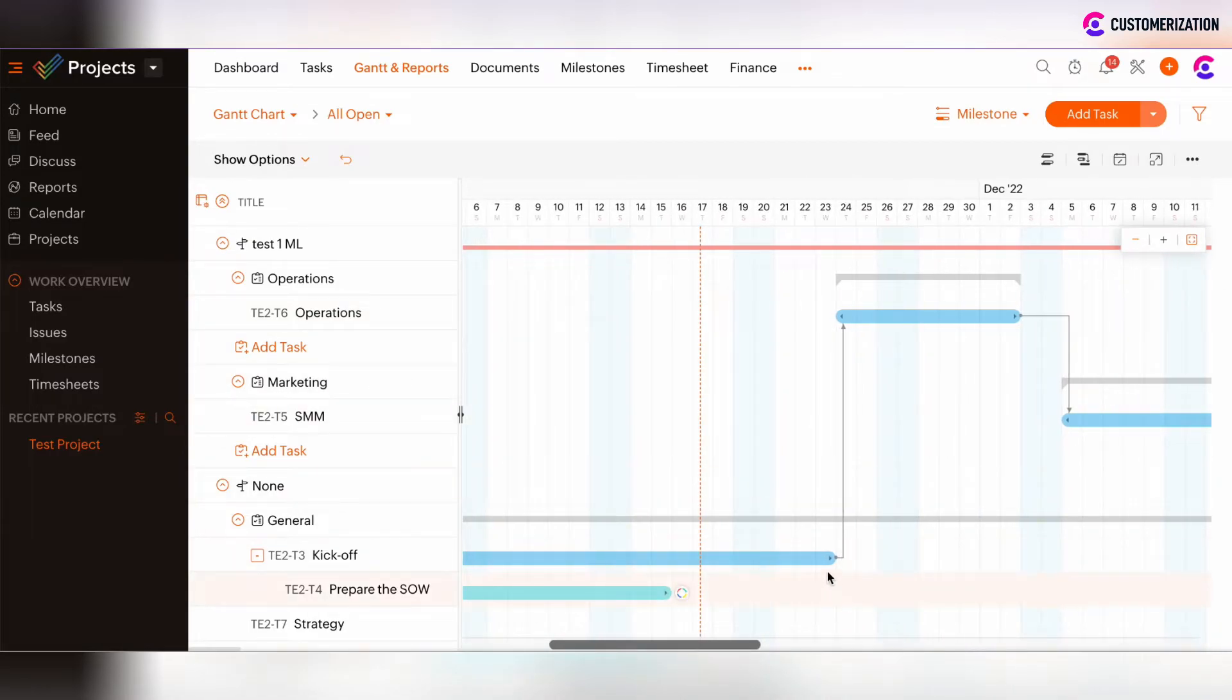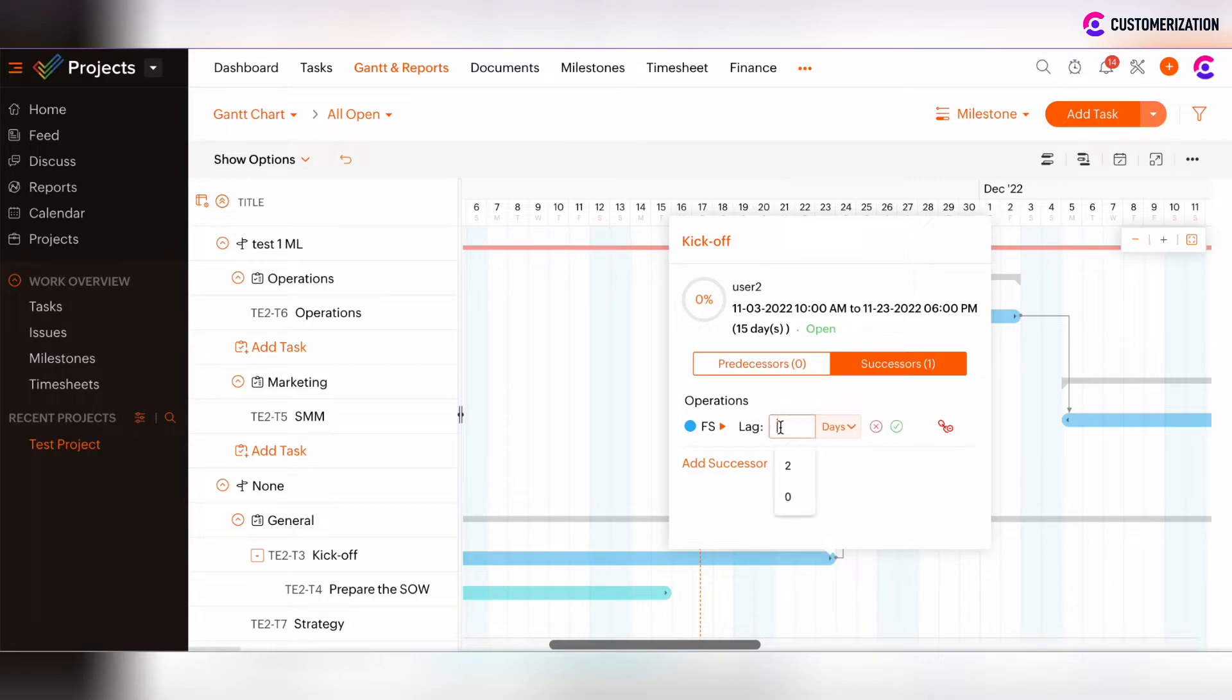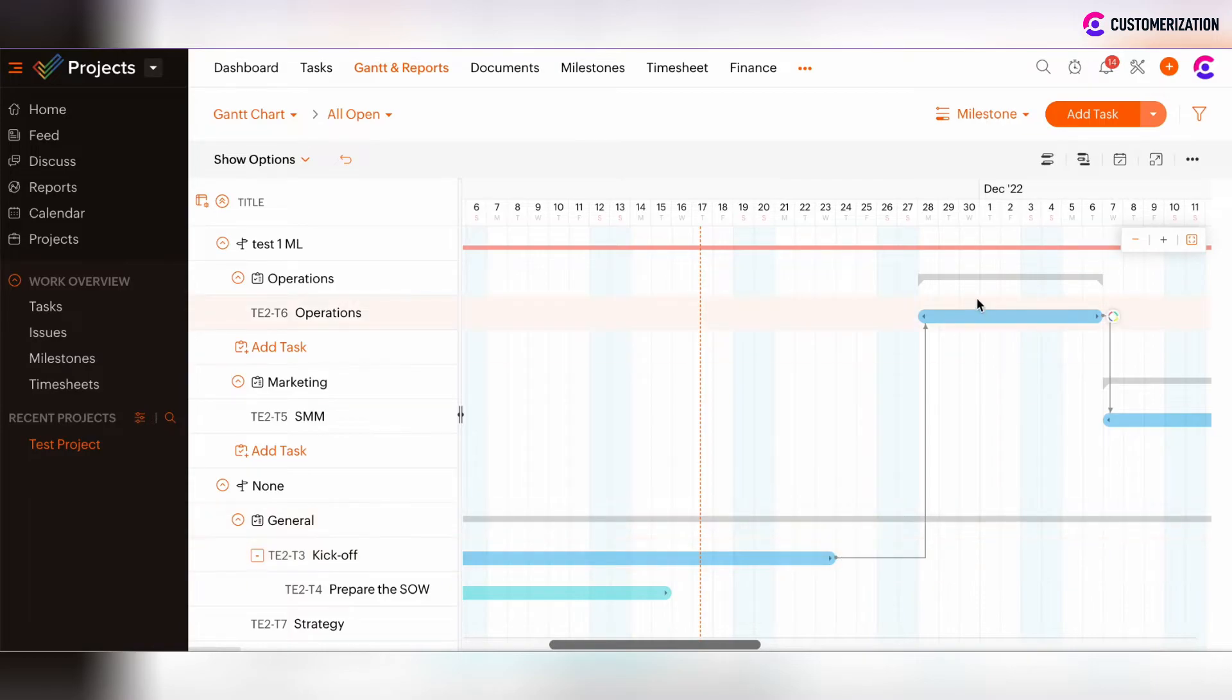There is the possibility to set the time lags or delete such time lags between the tasks. Click Set time lag and you can insert the amount of days between the tasks. So now two days lag is added after kickoff task and before the operations task.